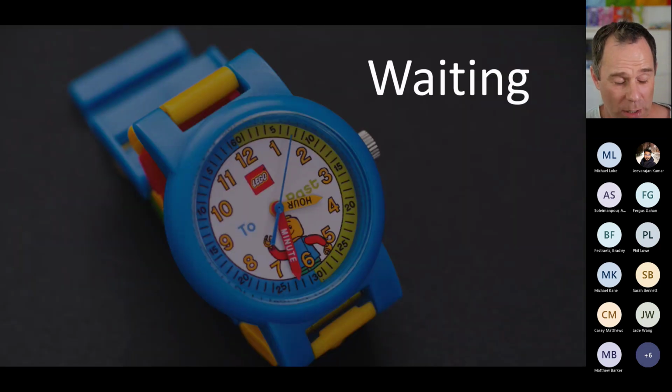Time-based estimates quite often forget about waiting time. As a developer, have you ever been stuck waiting for a business analyst to clarify a requirement with one of your stakeholders, or waiting for a sysadmin to set up a service account, or an architecture review board has got to approve your design, or IT or security has got to approve a third-party tool?